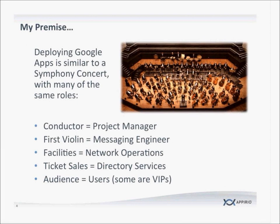One of the larger EDU deployments we're working on now, getting ready to begin in the first quarter of next year, is NYU — one of the largest universities. This is very characteristic of what we typically see in EDU: we will migrate content for staff and faculty, but for alumni and students we create the account, set it up, provide self-serve tools so people can selectively migrate the content they want, and deliver training in a different modality — like recorded sessions rather than classroom-style training.